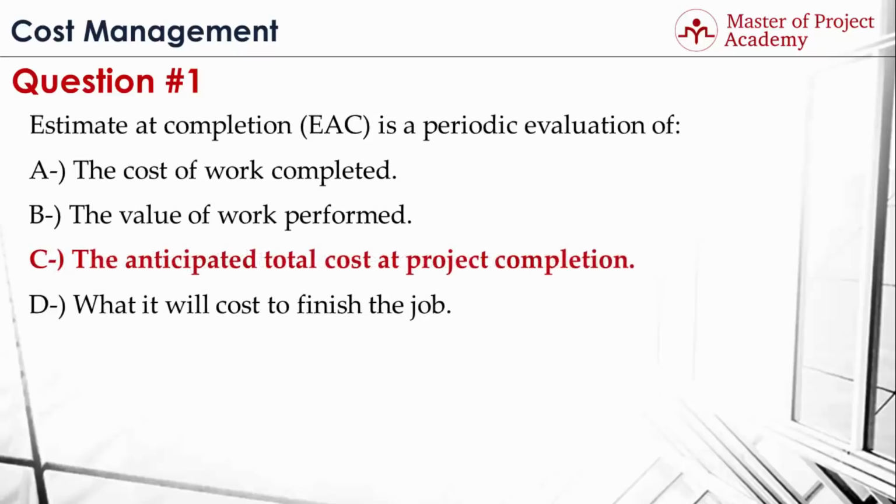C. After determine budget, the overall project budget is determined. However, based on actual results of the project, cost of remaining activities are forecasted, and the estimate at completion value shows the anticipated total cost at project completion based on the actual performance of the project.